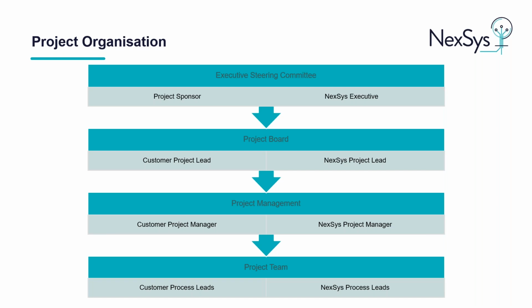The project managers from the customer and NexSys are next, followed by the process leads who make up the project team. Depending on the scope of the project, complexity and budget, multiple roles could be fulfilled by a single person, or conversely, multiple people may be required to fulfill a specific role. The role of the project board is to agree the project deliverables and objectives and monitor the work of the project team. In support of the project sponsor, the project board will own the benefits of the project and ensure that the project is on track to achieve them.